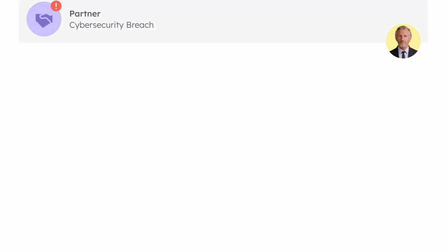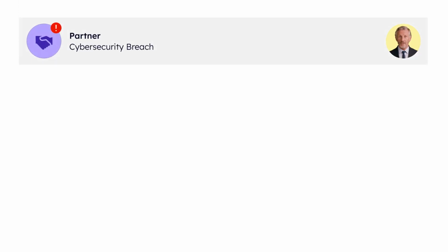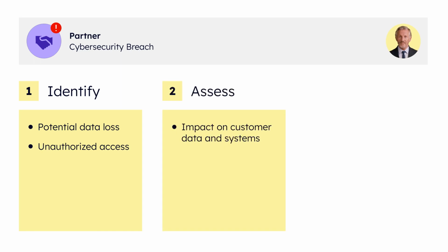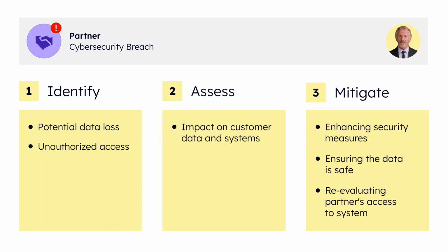Theory is great, but practice is where the rubber hits the road. Let's take a real-world example. Suppose one of our partners faces a major cybersecurity breach. We identify the risk of potential data loss or unauthorized access, assess its impact on our customer data and systems, and finally mitigate it by enhancing our security measures, ensuring our data is safe, and perhaps reevaluating the partner's access to our systems.